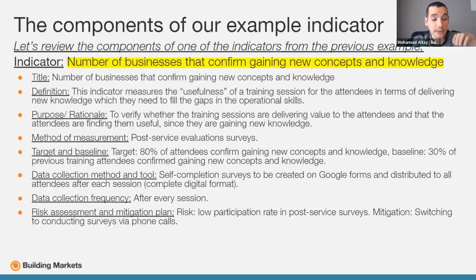Okay, that means after every interaction. But for this example in particular, the number of businesses that confirm gaining new concepts and knowledge is something that we need to track after every session. We don't need to wait for a month. We don't need to do the data collection at the end of every quarter.